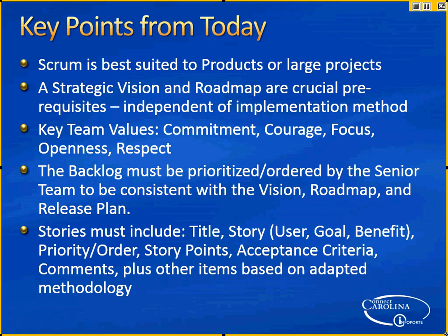What is the typical volume of work that we seem to be able to get through the sprint? Right, in terms of story points. You track that, and then when you plan your next one, you plan it based on that past experience.